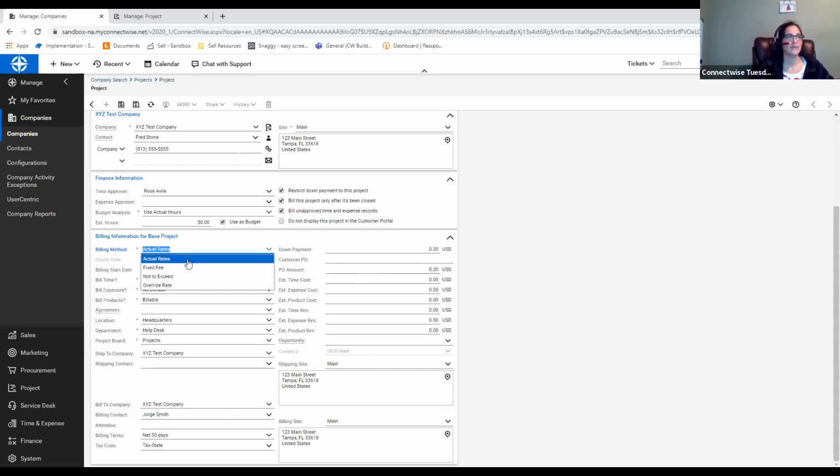So I can say this $5,000 project, I'm going to say I won't exceed 6,000. I think we should be able to get this done in about 50 hours, but anything that goes over $6,000, I'm not going to invoice you for. That's what a not to exceed is.